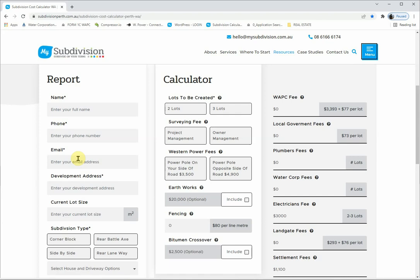Before I get too stuck into the calculator, I want to explain the inbuilt values. We project manage so many subdivisions that we know what things cost — at the height of the market, on the low end, and when things are really busy. In a market like 2021–2022 it's absolutely crazy, prices are through the roof. Rather than pick the highest price we see now, we change the values from time to time and take an average.